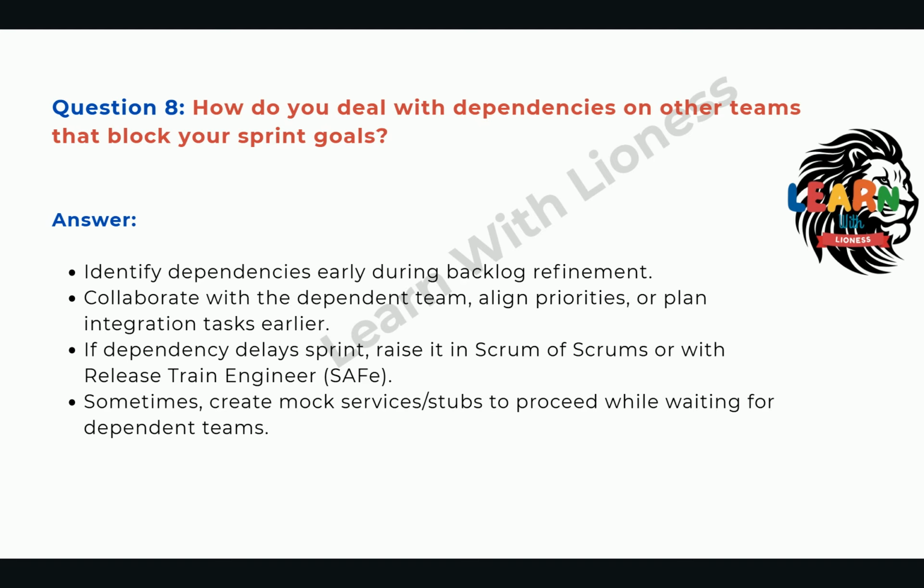If a dependency delays the sprint, raise it in Scrum of Scrums or with the release train engineer in SAFe. Sometimes, create mock services or stubs to proceed while waiting for dependent teams.